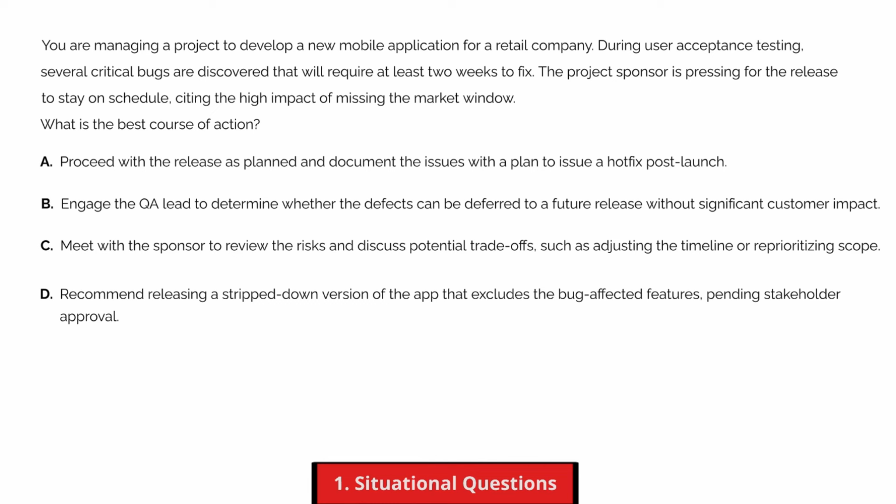All right, let's walk through this together. The best answer is C. Meeting with the sponsor is not escalating, it is engagement with the accountable decision maker. PMI emphasizes transparent communication and risk-based discussions with stakeholders when delivery or quality is at risk. By reviewing risks and trade-offs together, the project manager facilitates informed decision-making without bypassing governance or assuming authority.